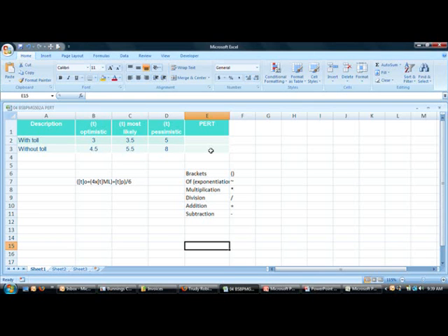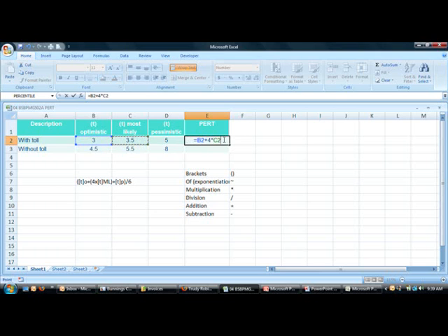The example that we set before, we'll now do in Excel. So remembering that this is the formula: the optimistic time plus 4 times the most likely plus the pessimistic time, divided by 6. Obviously, based on the BODMAS rule, we would need to put the first part in brackets to make sure that this occurs prior to the division by 6 being undertaken. And we can see that the PERT analysis is 3.67.